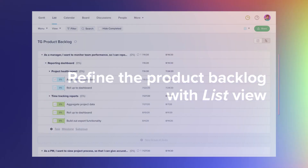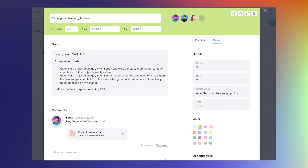ListView is ideal for reviewing and refining your product backlog in meetings with stakeholders or team members. Use drag and drop functionality to prioritize work on the fly and easily add start and end dates to schedule tasks to a future sprint. Work with your team during grooming sessions to add context and criteria to backlog items via the edit window. For example, you can assign priority and story points, list acceptance criteria or conditions of satisfaction, upload wireframes, or elaborate on important details to get each item closer to ready.